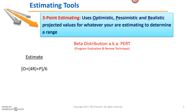The first step is to come up with a three-point weighted average, which is going to be called my estimate. To do that, I take the optimistic plus four times the realistic plus the pessimistic, and divide the whole thing by six. Why divide by six? Because you actually have six numbers on the numerator: one optimistic, four realistics, and one pessimistic. This gives me an average, but it's weighted — it's leaning towards the realistic estimate.